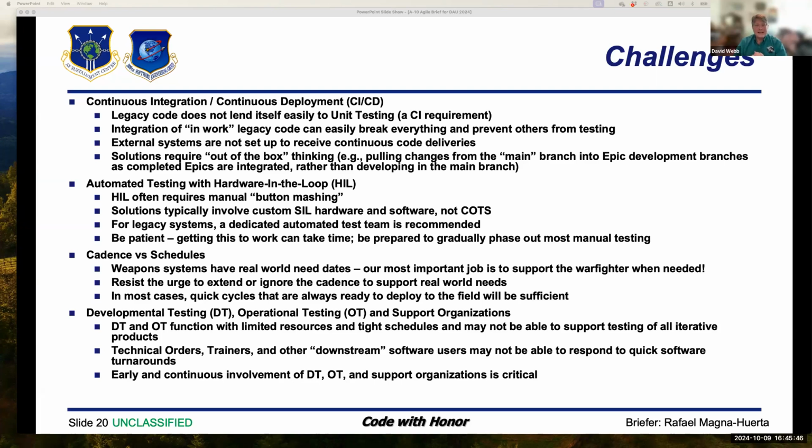One of the things we decided on early, if you want a lesson learned, is this. We used to do a system design change, and then you implement to that system design change. And if you find out there's a problem in implementation, you have to write a change request to the system design and get it changed as well. It was kind of a long process. So this time around, we do an epic description that can be put into the system design update, and we don't finalize that till all the software is complete and everything is known for sure. Getting them an early copy of the system design change request turned out to be not helpful. So instead, we give them the epic and some of the grooming information that we have with those.